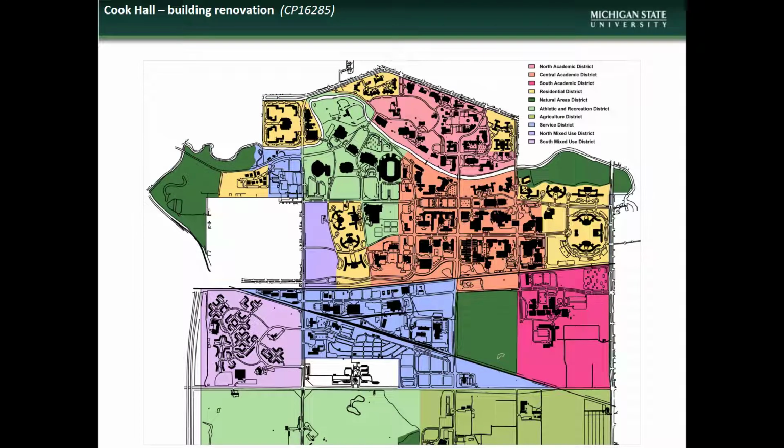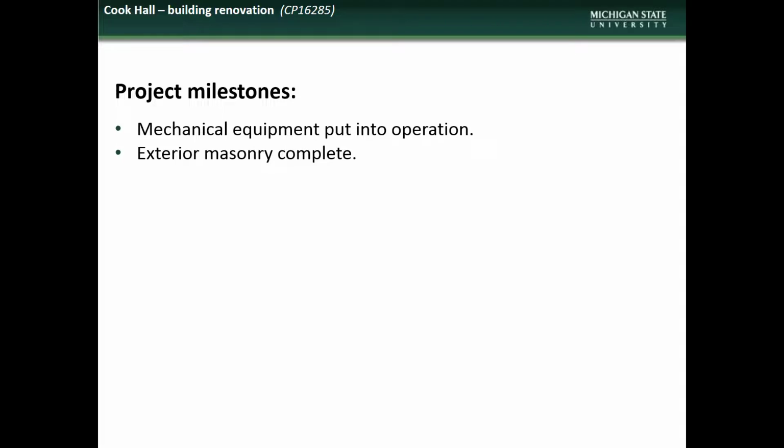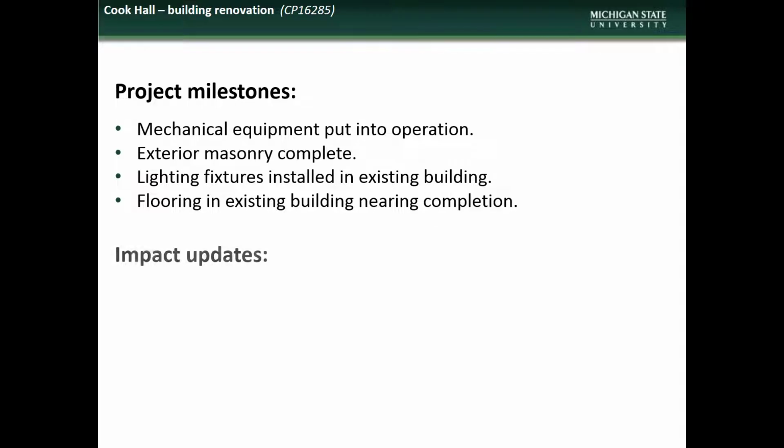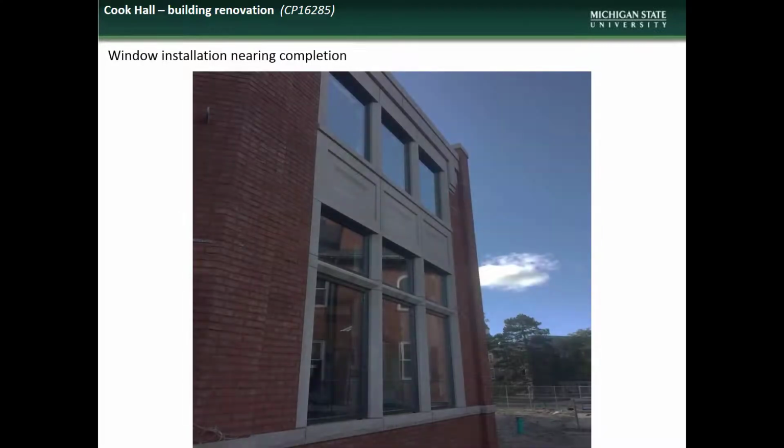Next is an update on the Cook Hall renovation project. Accomplishments during the month of October included the putting of mechanical equipment into operation, the completion of exterior masonry work, installation of lighting fixtures, and progress on flooring installation. Impacts to the campus community during November will include the continued inaccessibility of the construction zone with pedestrian detours in place. Here is a shot of the new window units in place,